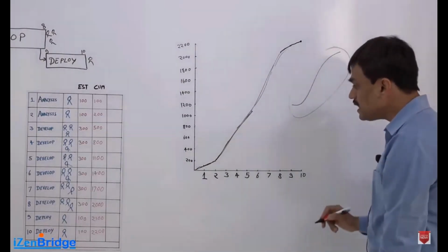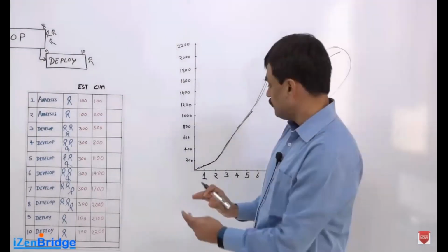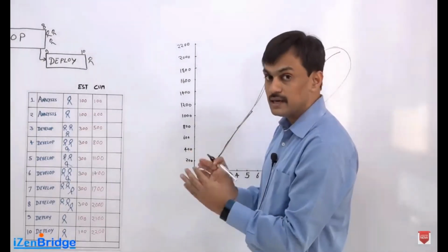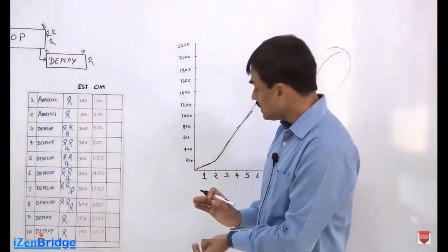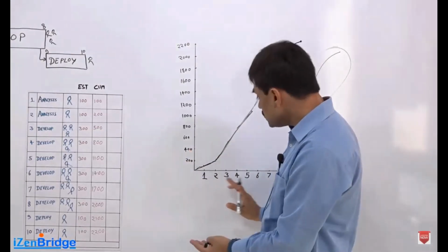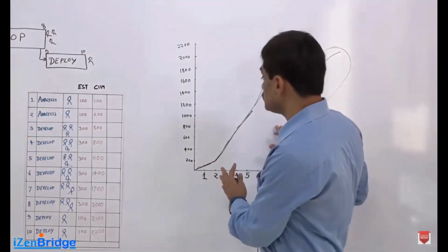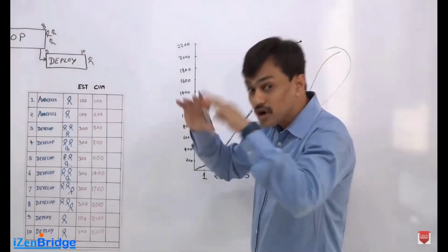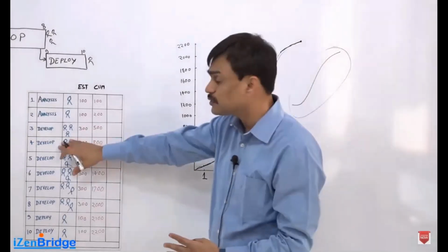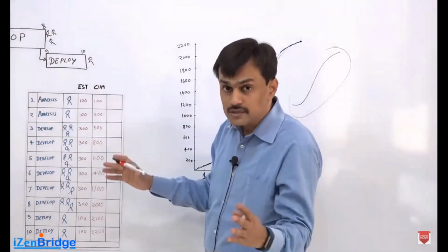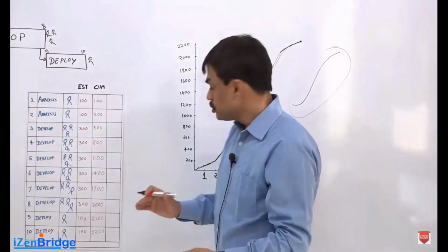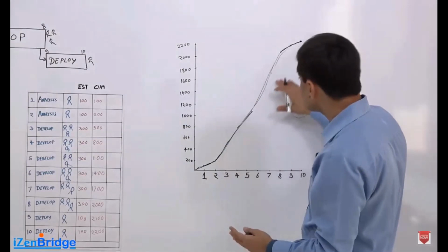The idea here is initially we might be involving less number of people, and that is why in the initial duration of a project we may spend less money. As we get into execution, we are expected to spend lots of money, because more and more people start working on it, and there are $300 they are spending every day. So our curve goes steep in between.